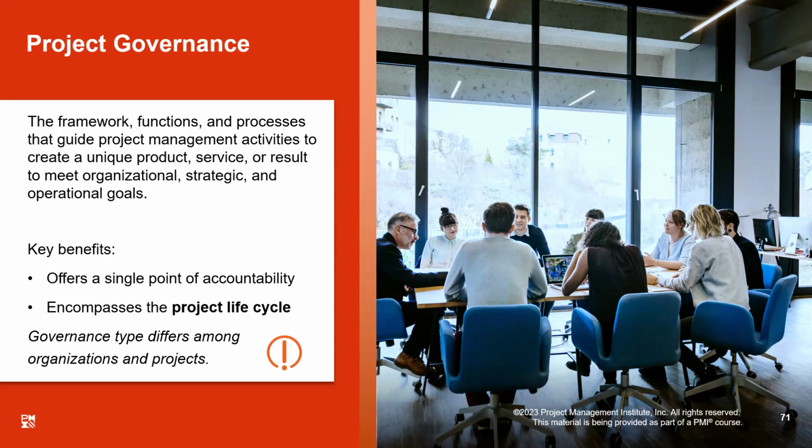Now, I do understand that governance type may differ from one organization to other, from one project to other, and it is quite valid. It is not a template. Governance is not a template that you can create a governance plan and all the projects in the future will follow that. No, this is not like that. The governance is created for every project because every project may have different needs and requirements.